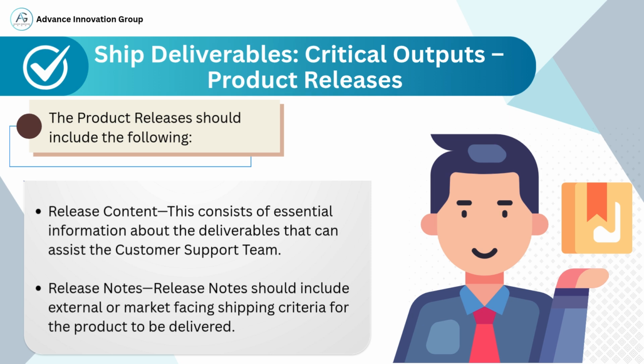2. Release notes. These are typically external-facing documents, shared with customers, stakeholders, or even the market. Release notes should clearly describe what's included in the release, any limitations or known issues, and the shipping or deployment criteria. Together, the release content and release notes ensure that both internal teams and external users are aligned and well-informed. This minimizes confusion and enhances the overall customer experience during a release.